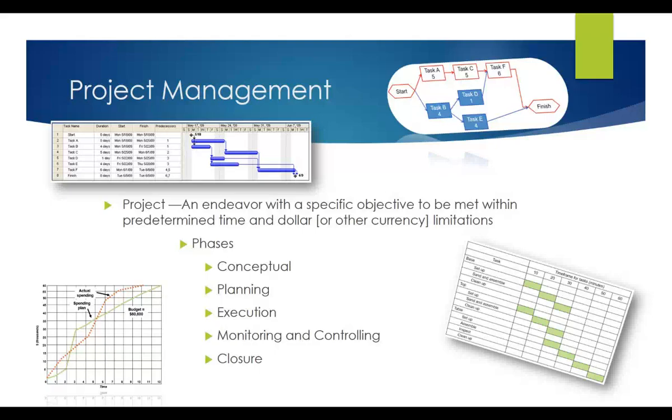When the project's finished, normally a final project report should be created and distributed. It should include a post-execution financial summary. So we look at it and we say, here was the budget, here were the actual expenses, did we hit the numbers or did we not? And even then, at a later date, when everything has settled into its normal state of operations, maybe 6 months down the road, performance can be reviewed to see whether or not the returns on the project investment were continuing as expected.